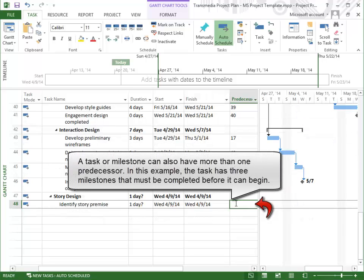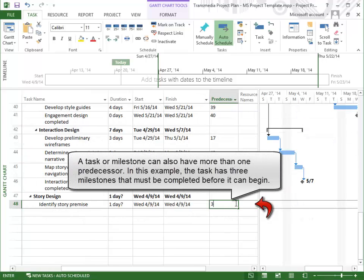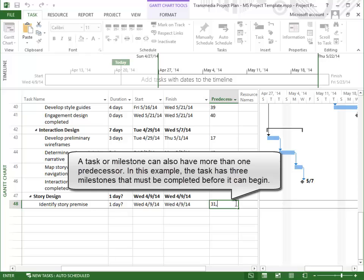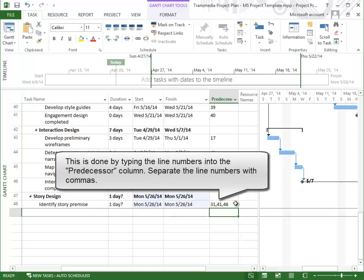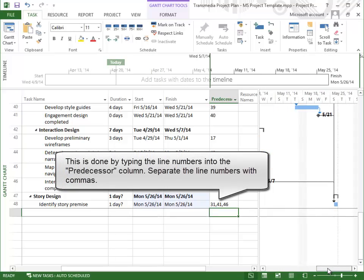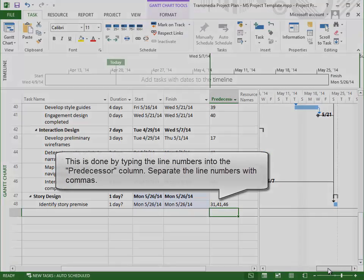A task or milestone can also have more than one predecessor. In this example, the task has three milestones that have to be completed before it can start. This is done by typing the line numbers into the predecessor column, separating them with commas.